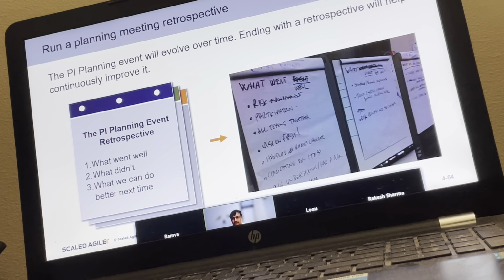They start from the presentation of the draft PI review, and the second activity is management review and problem solving. So in many mature organizations, the first activity is a presentation and the second is management review and problem solving. Why I'm sharing this is that things will evolve as you go along, but this meeting can be seen as a default agenda to understand how PI planning might happen.